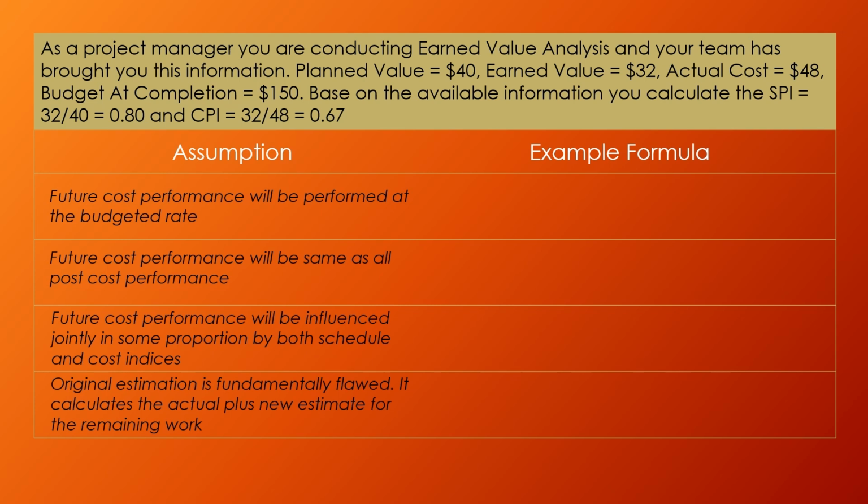If you want to know how much money you're spending, you may use the Cost Performance Index. The ratio of earned value of the work completed to the actual cost of doing the work gives the CPI. The Schedule Performance Index, like CPI, assesses how well time is being utilized. Earned value is divided by planned value to get the SPI.